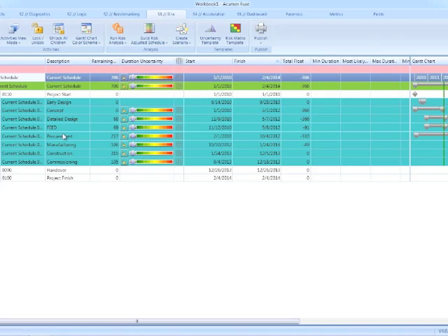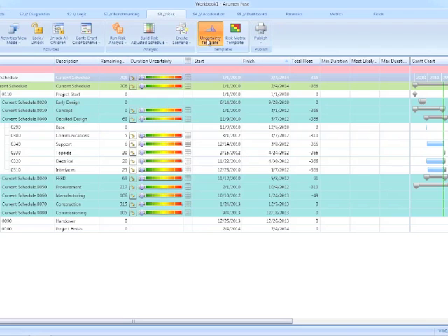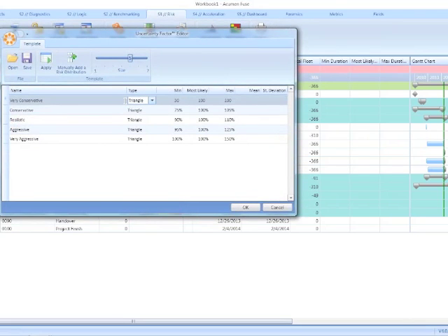So here's our Primavera schedule. Again, we've got early design, concept, detailed design, FEED, and so on and so forth. Before we start our mock risk workshop, let me just show you our example here, our uncertainty template. Earlier, we had a template that was looking at historical performance. This is another example of an uncertainty factor template, but using a 5-point scale based on realism. So does the team member think the activity is very conservative, or realistic, or very aggressive?